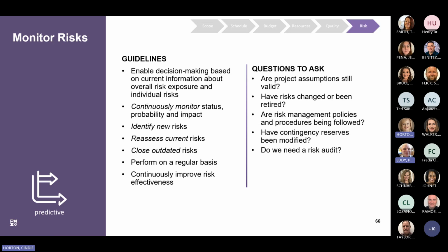One of the last questions we'll ask ourselves as a project manager is, do we need to do a risk audit? Risk audits are a specific type of project audit that may be performed to examine and document the effectiveness of the implemented risk responses. This also reviews the complete risk management process and its effectiveness, as well as how closely the activities follow the initial risk management plan. The risk audit format should be defined before it's conducted, and if it is a common activity, it might be included in the actual risk management plan.